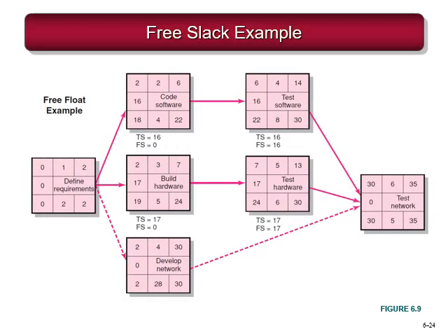Over here in this slide, we see another concept of free slack. So what is that free slack? We see over here this activity 2. So activity 2 is this one here. It has got a total slack of 16, which is the difference between the early start 2 and the late start 18. So 18 minus 2 will give you that 16.